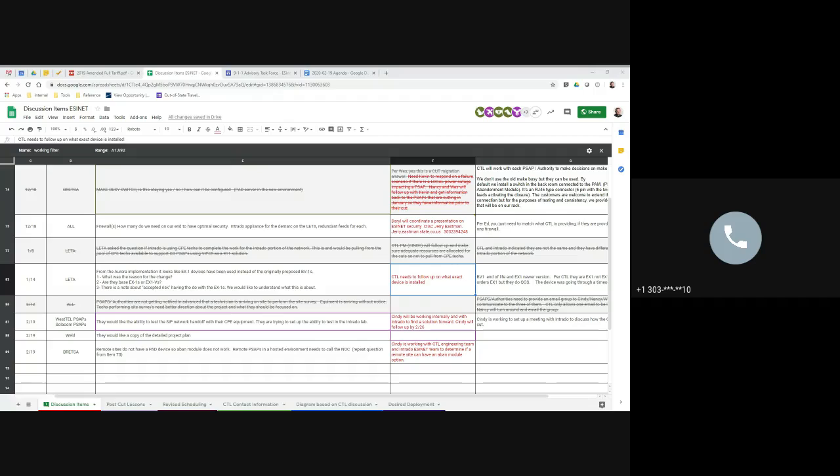I would say by Monday, Tuesday. I have the generic implementation guide about ready. I need to tweak the project plan a little bit based on some of the lessons out of Boulder and Aurora. But I can certainly share a generic copy of that. And I'm putting it into more of a master schedule so that each PSAP, or group of PSAPs, will have their own section that I'll be able to share with them that shows where we're at on their specific project. Okay, great. So I'll just flag that by 2:25, so Tuesday.